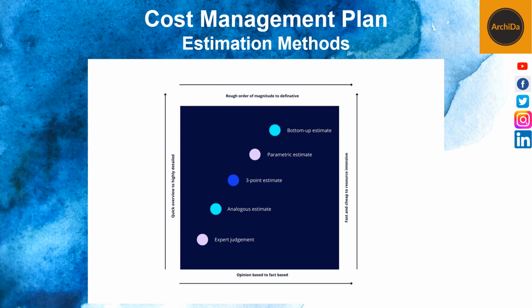Now, what is a cost management plan? Here are some key elements that must be included in a cost management plan. First is the estimation method. Explain which cost estimation method was employed, such as parametric, bottom-up, 3-point, etc.